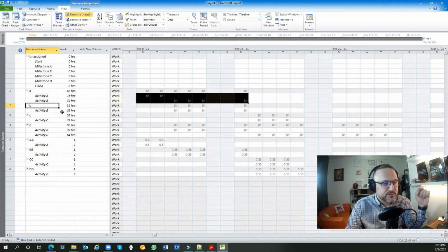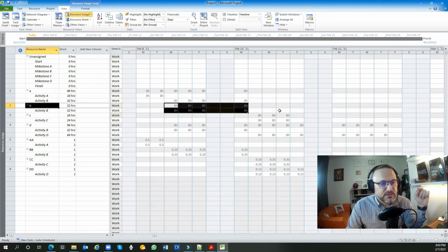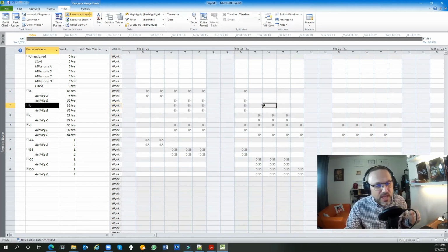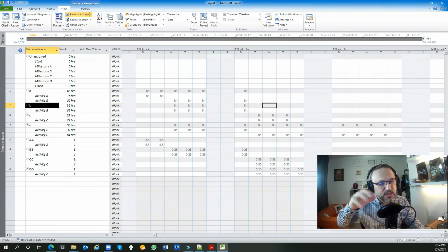Meanwhile, person B is defined in this duration. So you have to arrange the person. If the person is dropped for a reason, he is sick, he is assigned to another project, or he's not available yet as an external resource, that means you have to find a replacement, or you have to shift this activity to another duration.